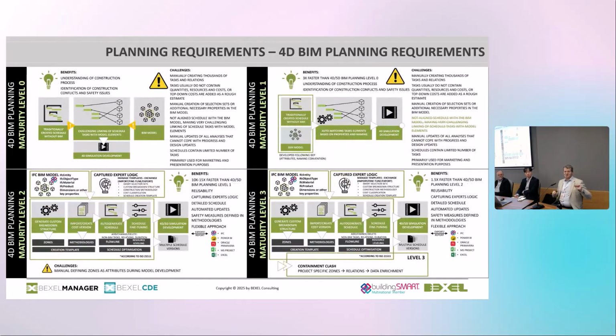To the elements in a BIM model. Okay, not rocket science. For me, it's maturity level 1. Second, I have a script which automatically connects this. Okay, it's time saving, but the scheduling is again manually created in P6. Whenever I change design, I need to manually change this.